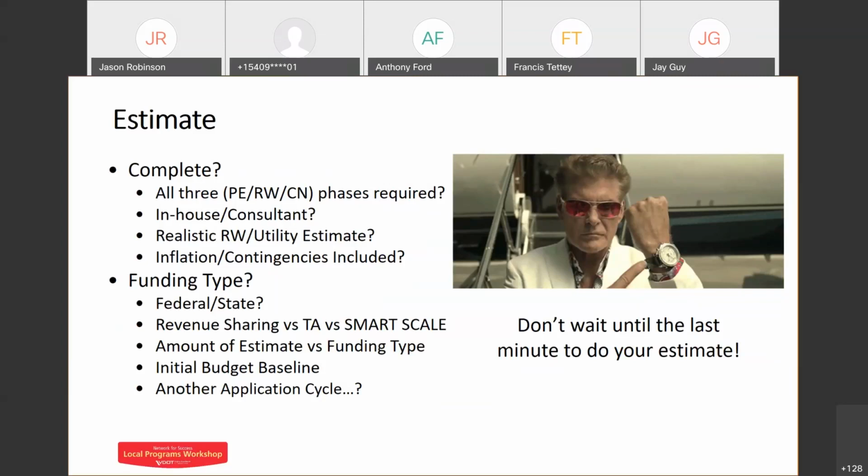Regardless, there's stronger funding support for revenue sharing, so you can tackle larger projects. Now, do you know how much each CTB member gets for TA funds? Anthony covered it before, per fiscal year. Well, each CTB member only gets $1 million per fiscal year.